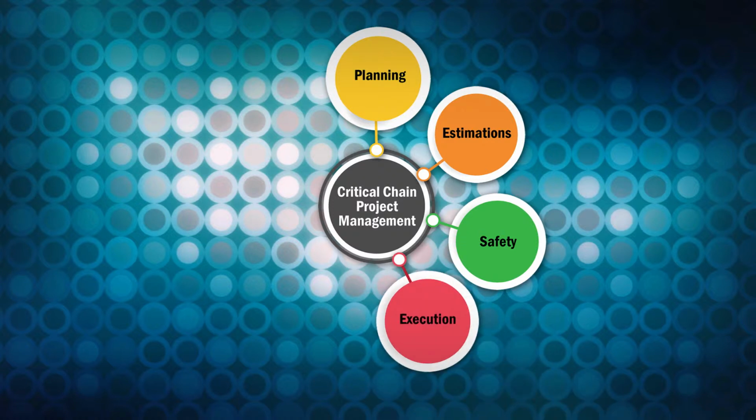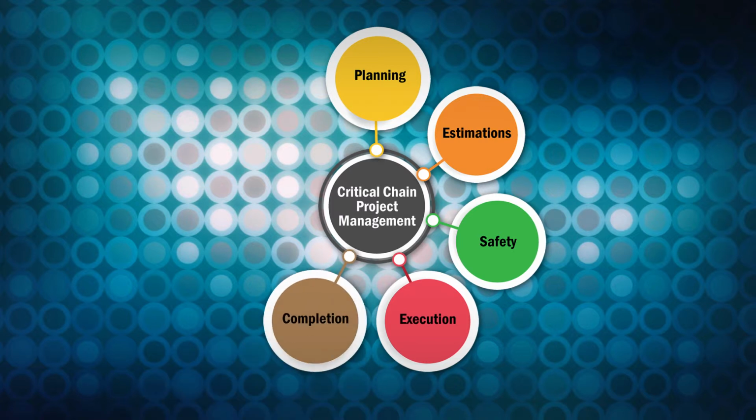Execution. Priorities. All resources on a project are given clear and aligned priorities relating to the health of the critical chain relative to its associated buffer and hence the project as a whole. Completion. Resources on a task are encouraged to follow the roadrunner approach. When there is work available, it should be progressed at the fastest possible speed.